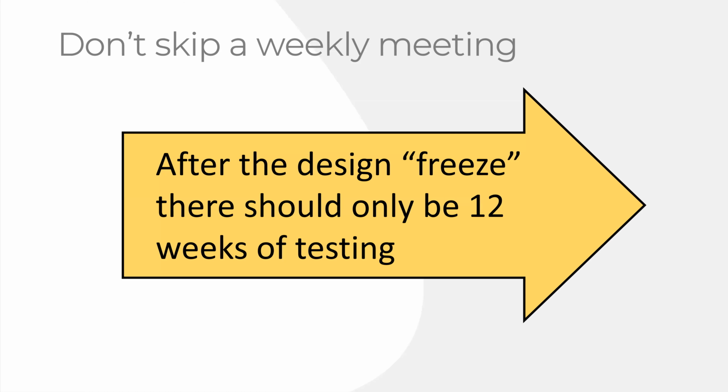Now, we have entered the phase where we are actually going to start preparing the 510K. So if you are one of our clients, up until this point, we should have been working on your project probably on an hourly basis, and we were focusing on the pre-sub and your V&V testing, helping you implement your quality system, helping you with any kind of supplier issues. But now you've had your design freeze and you've started your V&V testing. This is the point at which we should start using our table of contents to manage the project and preparing the 510K. We normally ask clients to have weekly meetings with us, a recurring meeting.